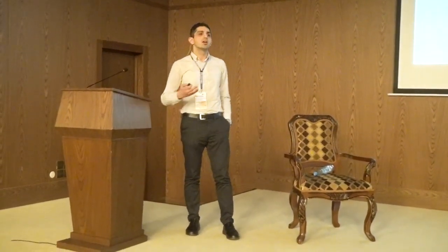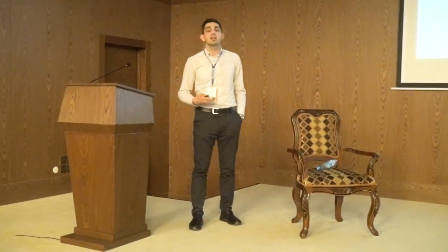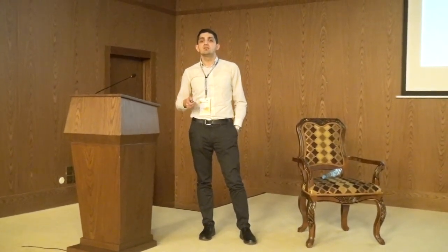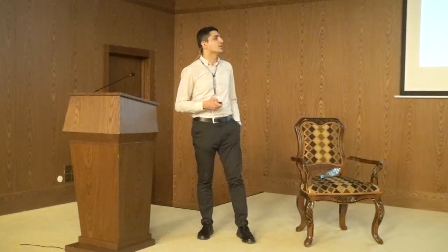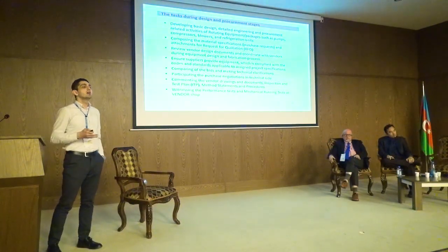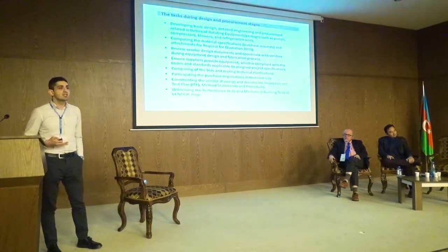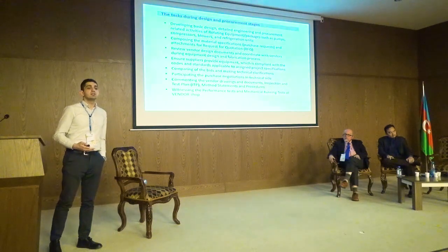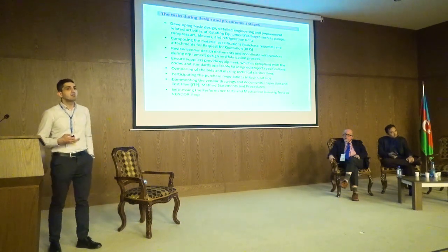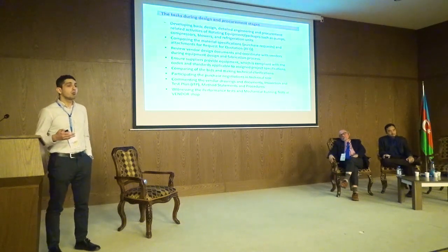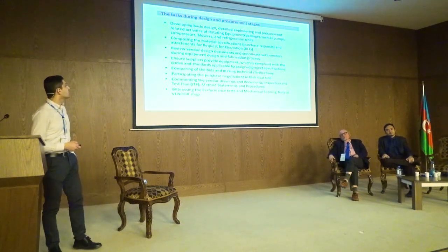Like they propose rotating machinery in return, and then the rotating equipment engineer must do technical bid evaluation. So he has to investigate all these documents. He has to see whether the rotating equipment being offered is in conformance with the standards that are mentioned in the design specifications, whether the vendor can fully provide all the scope of work and scope of supply.